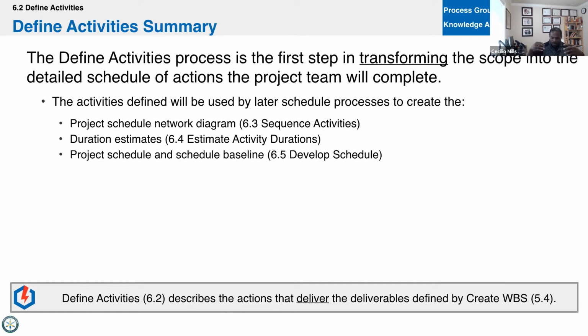And then if I go below that, it might go, okay, install and set up the camera, set up lighting, plug in this, plug in that. As soon as we get to the point where we're using verbs, we know that we've gotten to the lowest level on our WBS. We can put those verbs into our activity list. So that's the quick version of teaching someone to do a WBS.